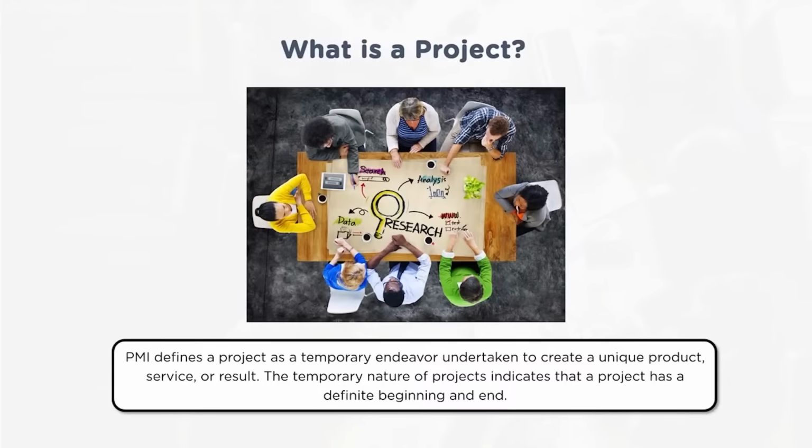Now next, planning. As we have a basic understanding that, yes, this project has to be done, and a discussion with the key stakeholders has happened, it moves towards planning. In planning, one will understand the project in its entirety. If it is a waterfall approach, one has to have a clear articulation of the entire project, with comprehensive details and a holistic approach. If you're going with an agile approach, in this planning you may have a big skeleton, and as you go through each iteration, you go into a deep dive of detailed planning.